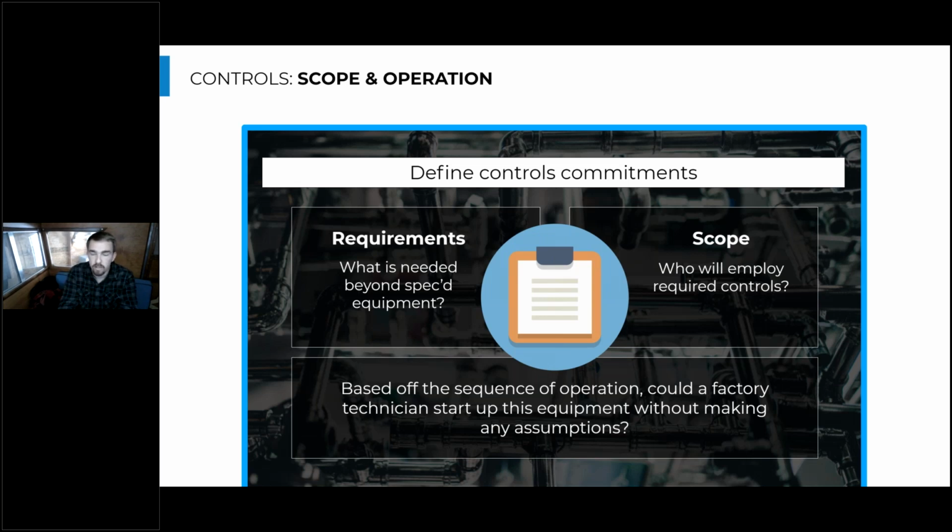And we'll define those three different categories a little bit better in a second here. But the other half of this is who's actually going to install the controls. The plumber is buying the equipment, the electrician is wiring it up, but then there's this low voltage wire that needs to be run between the tanks and the heat pumps, and potentially to the communications in the building.